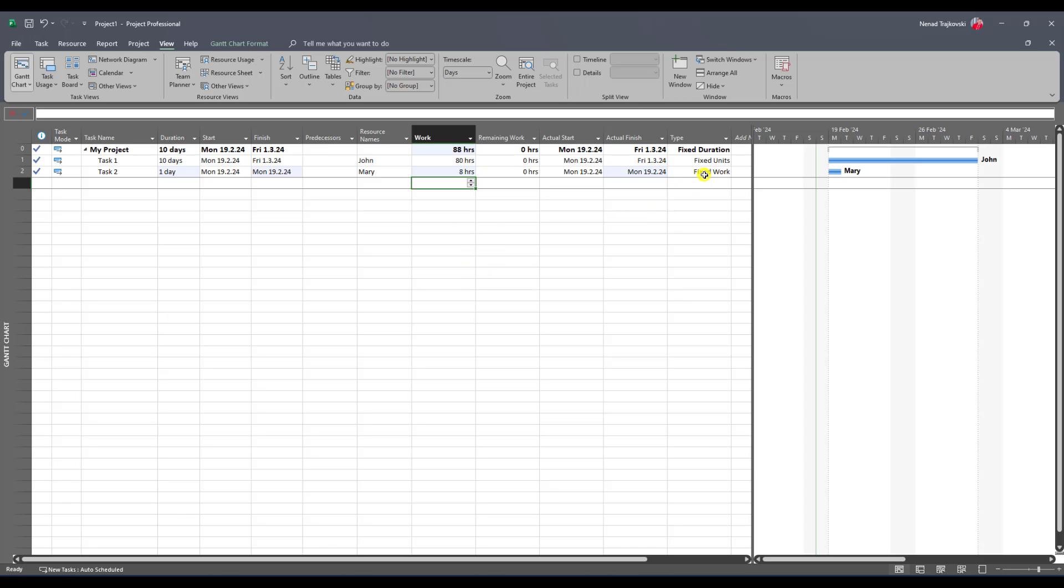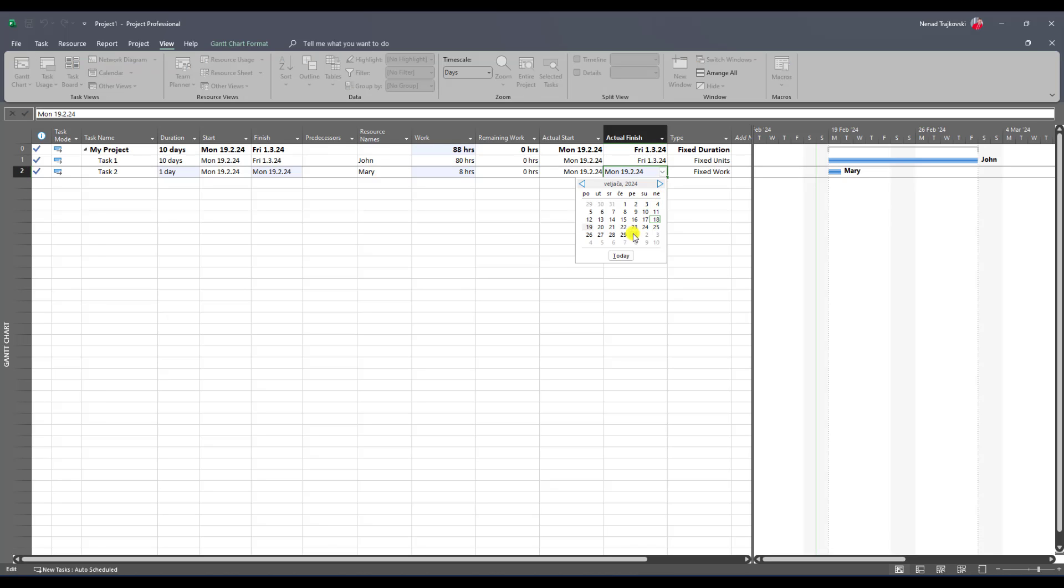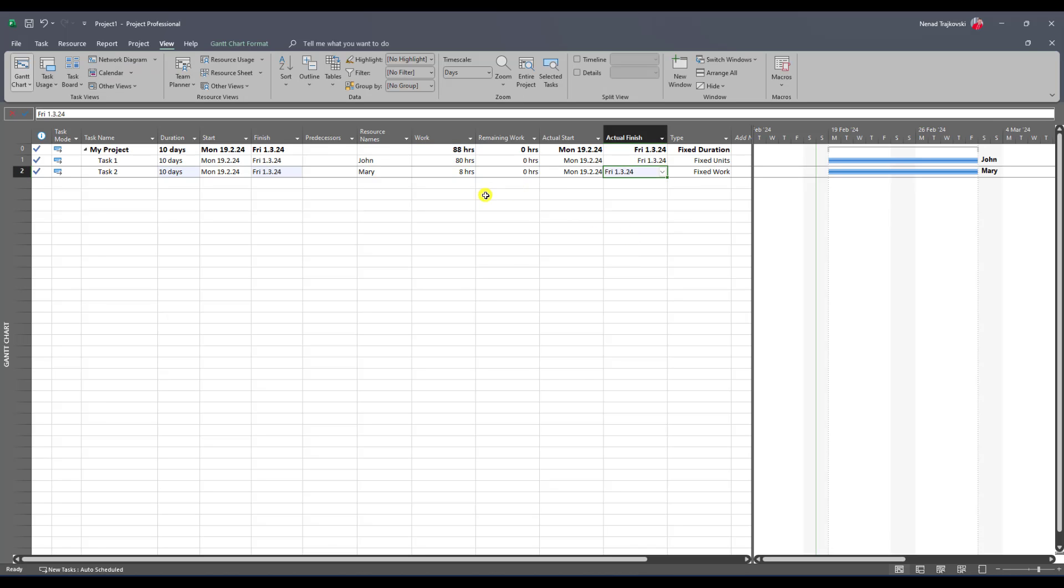You will see that this task will also have 10 days, but if you go to Task Usage View, you will see that those 8 hours are done in 10 days.